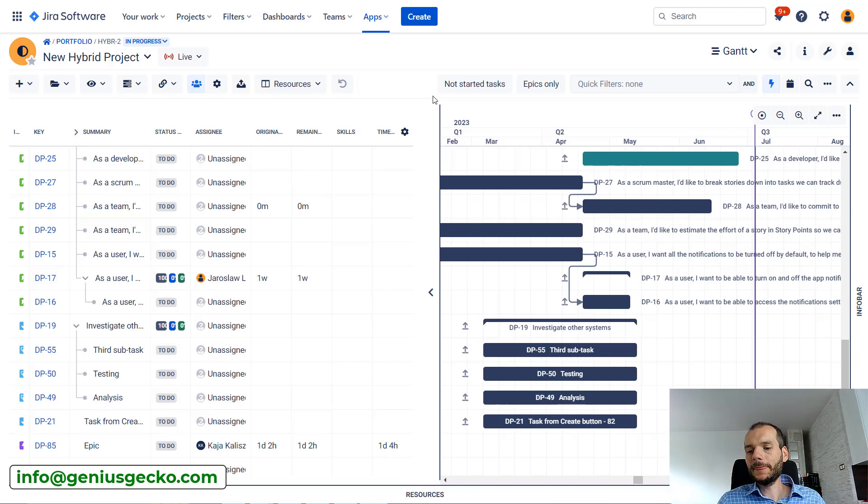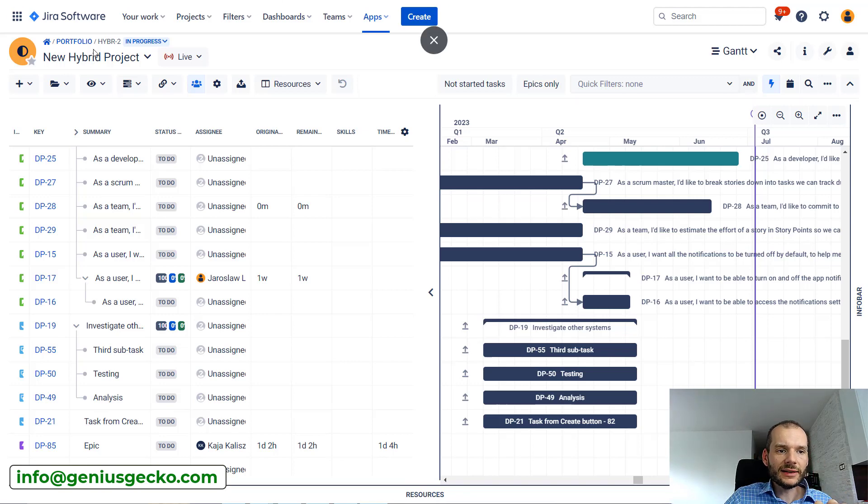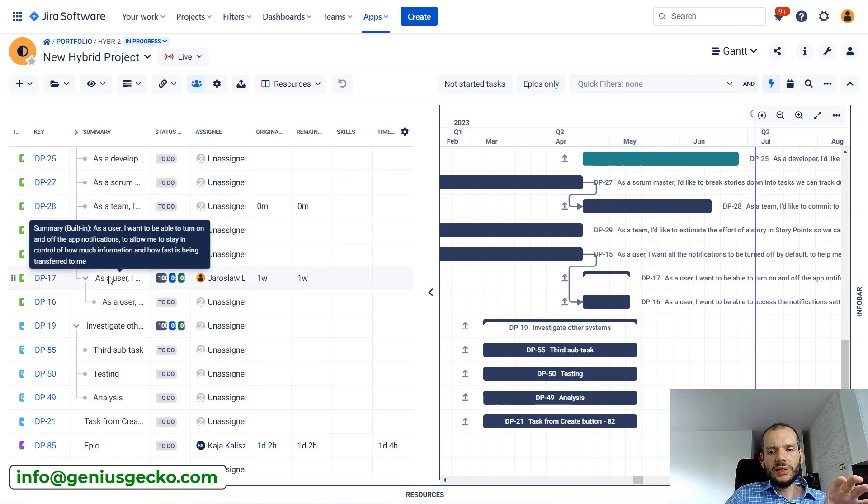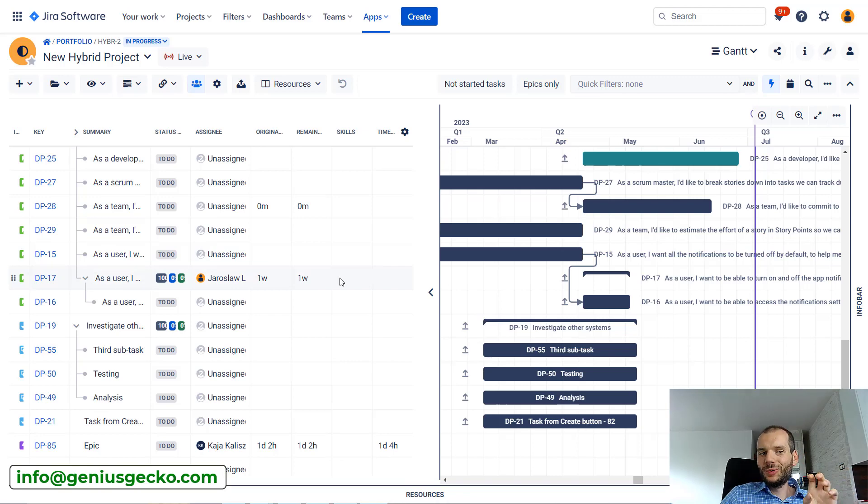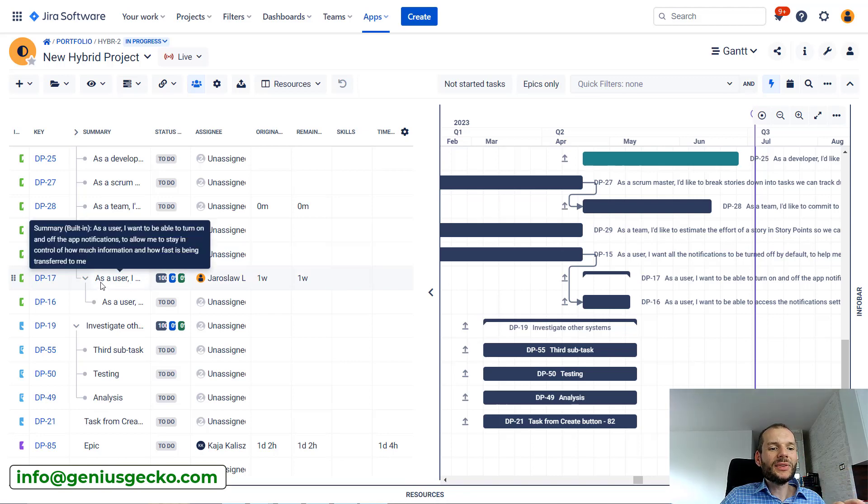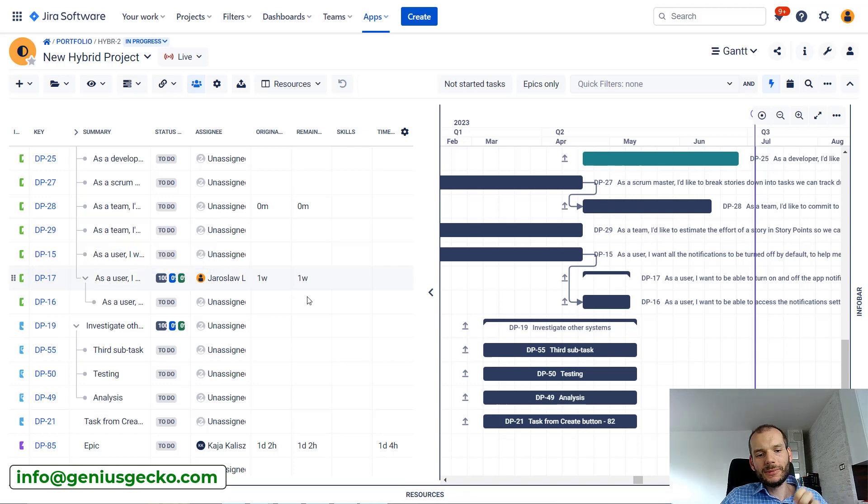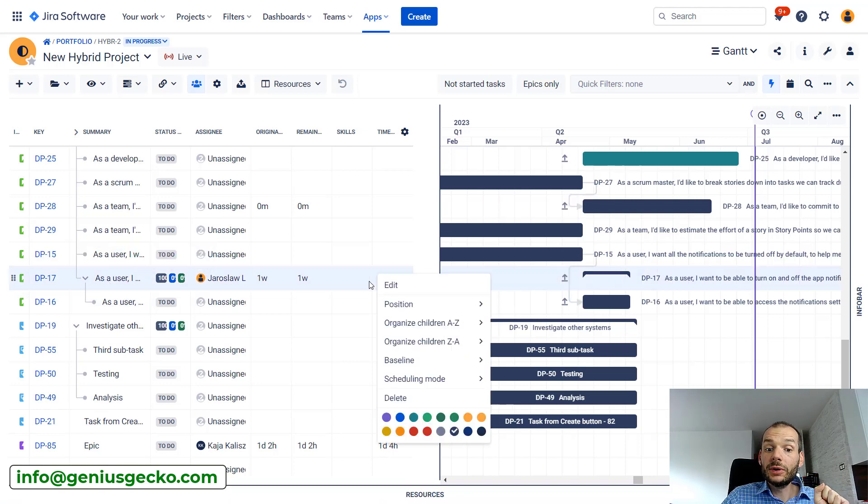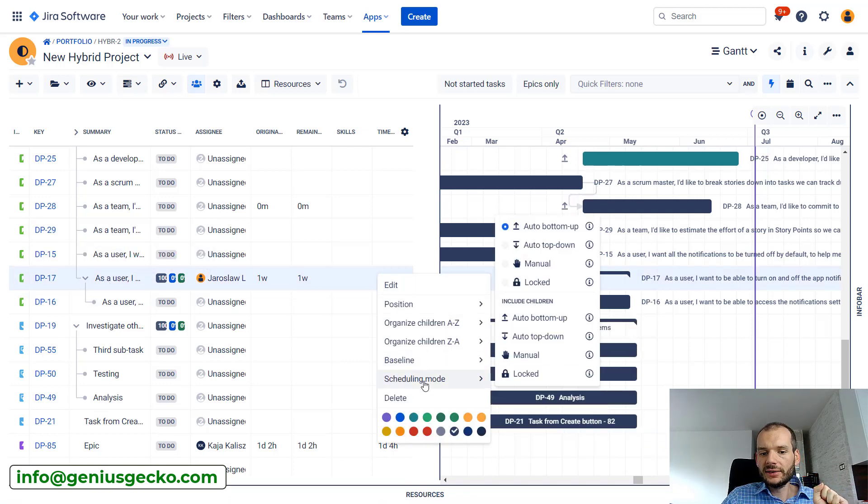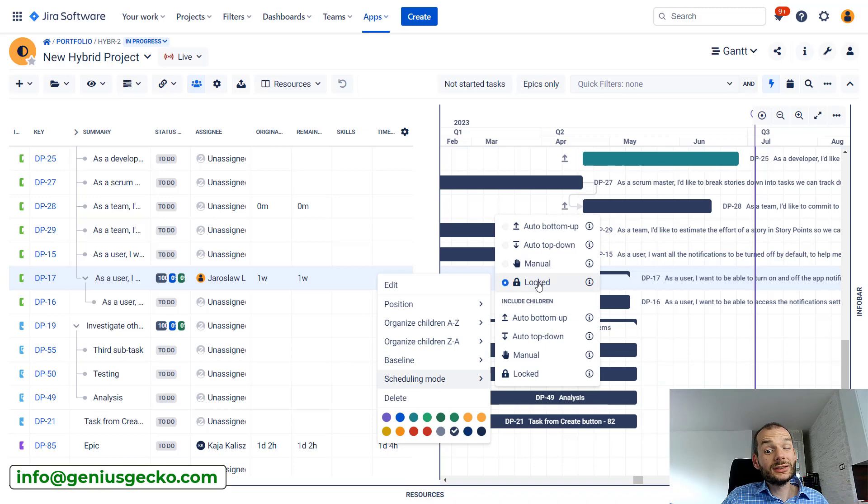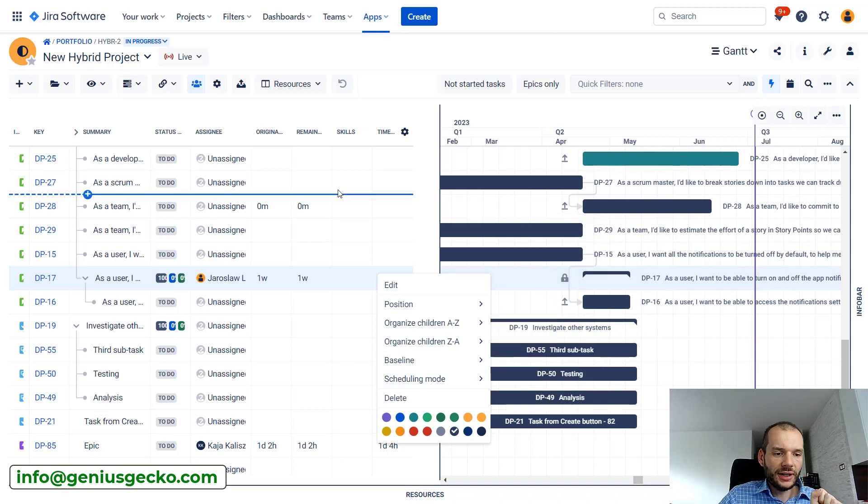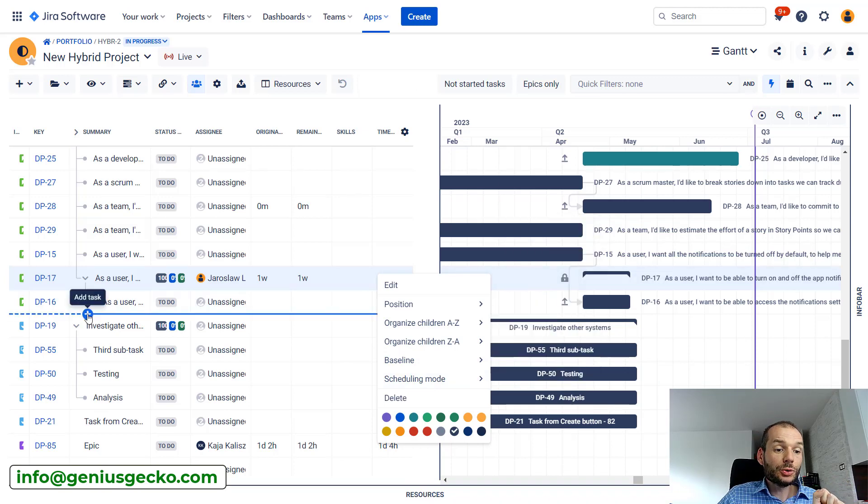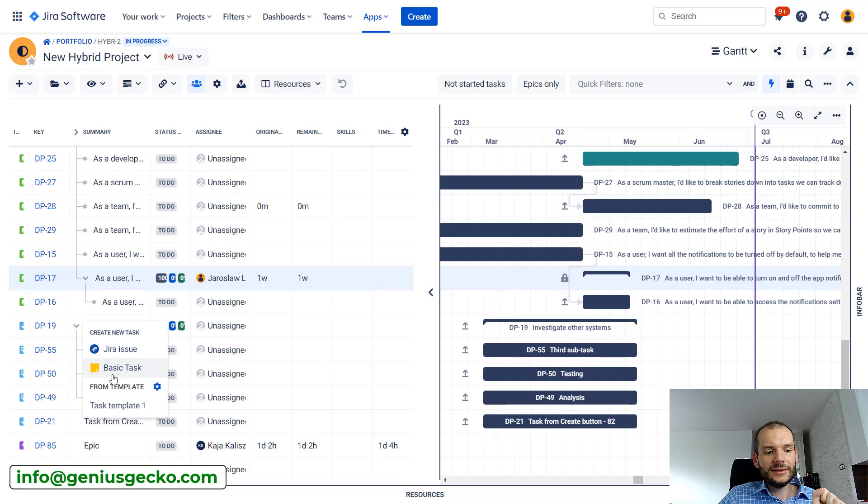But again, before the new plan is approved, I do not want to change anything in the existing plan. So in the live scenario we will lock this task. The new work that we identified is a contributor to this task, basically a child task. So for now I will lock the scheduling mode of this task so that the start and end dates are never changed over here.